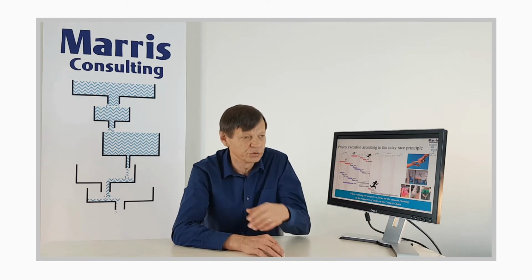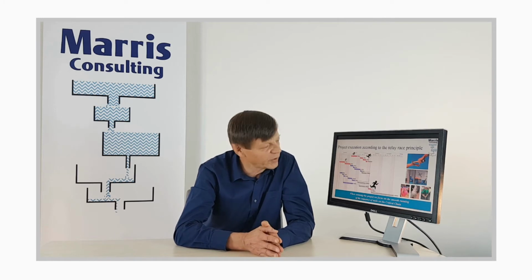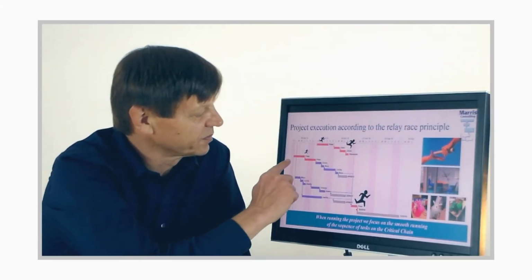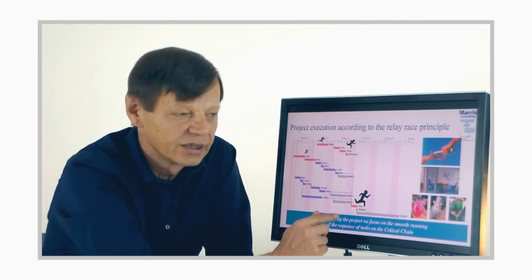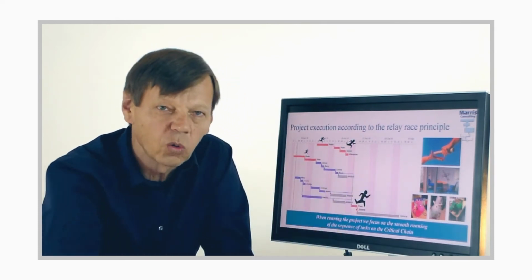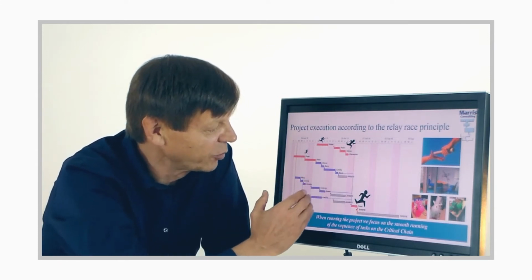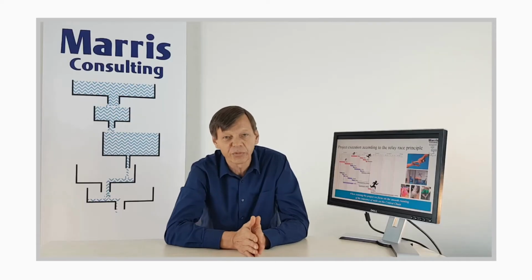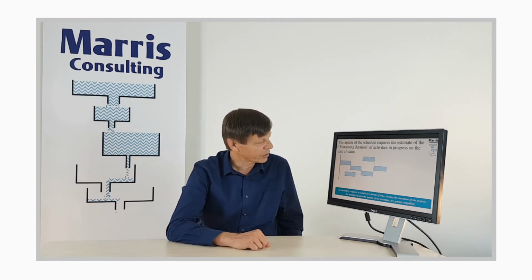The project was, of course, overdue, over budget, and everybody screaming all over the place, and we applied critical chain. When we'd done the modelling and worked out what was going on, in fact, the critical chain was actually being done by a dozen people out of the 500, right? So we had to protect the work of 10 people within 500 to ensure that the project as a whole went properly. And the 490 others, we just had to synchronize their work so that they would be feeding the critical chain appropriately.